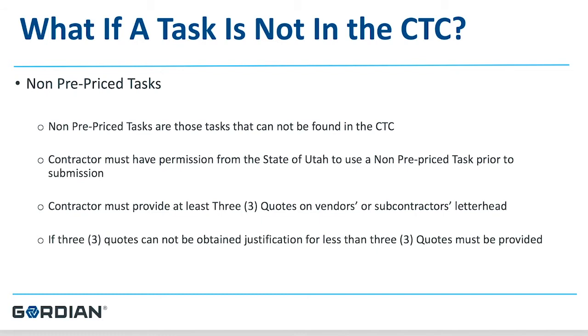Non-prepriced tasks can also put a burden on a contractor who must prove the unit price they've created. Lots of times contracts require them to get three quotes to back up the unit price. So remember: look in the price book first, and if you can't find the item you're looking for, feel free to create a non-prepriced item — just know you will have to give some backup to the owner to prove the unit price you've created.